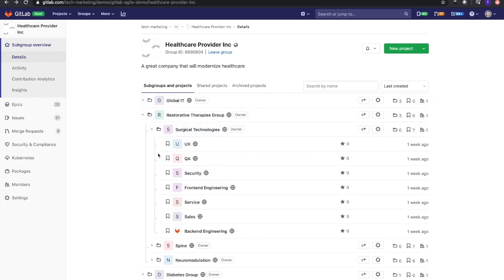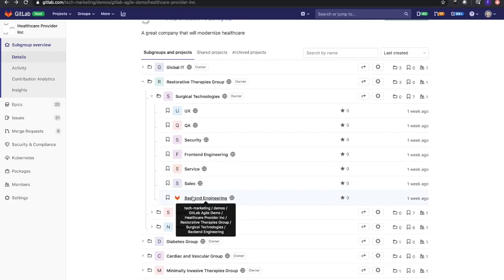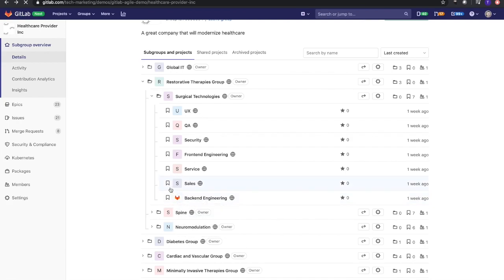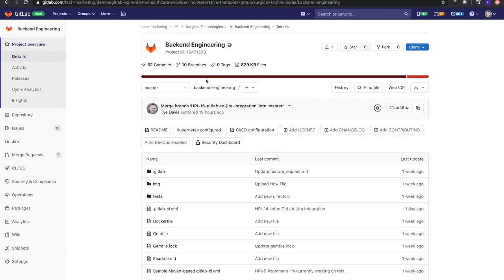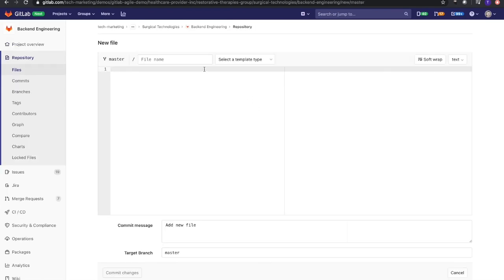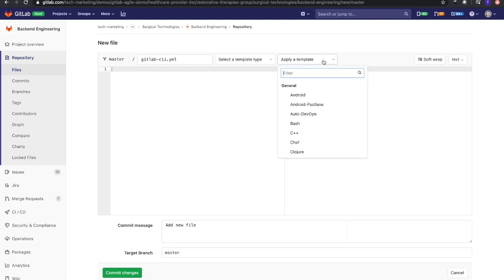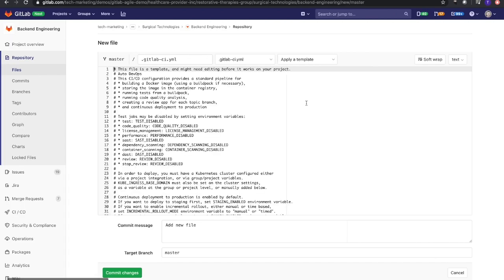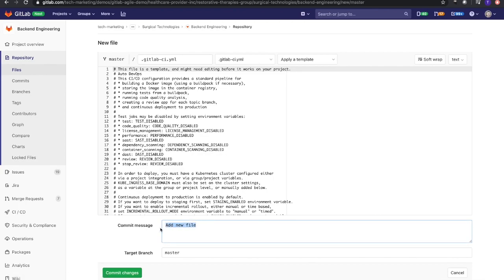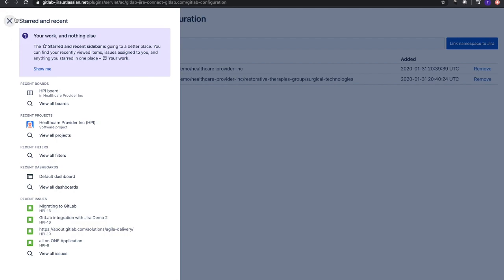If I go into Backend Engineering - let's say this is the team that wants to set up that Jira integration - I just add a simple file to this directory, make it a YAML file. I already have a couple in there, so we'll give it two i's so it doesn't give me a warning telling me I already have that file. Let's give it an AutoDevOps template, something that comes along with GitLab. Down here in the commit message, this is how we're going to link to our issue or user story inside of Jira.